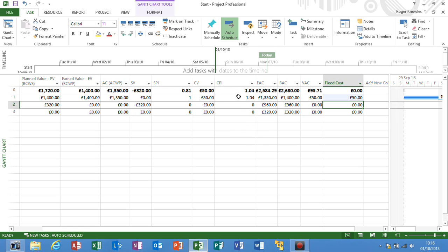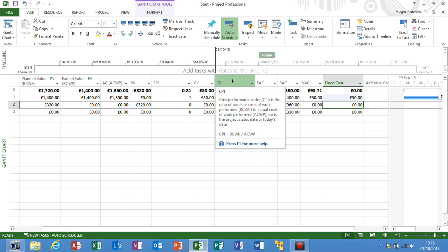And you can see again the cost performance indicator and the cost variance is now all in the positives. We're actually making money on what we originally estimated. In other words, what we estimated is more than what we're actually going to pay. And again, our CPI has gone above 100, or 1.04. So there's a demonstration of just trying to see the simplicity of how the variances do reflect actuals. It's worth experimenting also with things like actual finish date, maybe showing how it finished a day early or a day late. Again, watching the scheduled fields, not the cost fields. And that concludes this video.